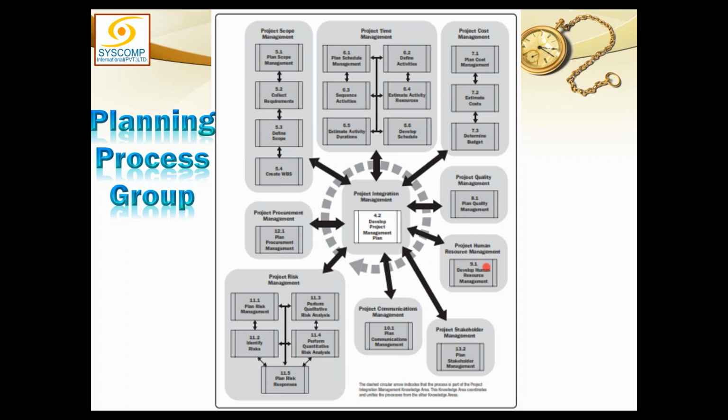I do not create any baseline for any other plan. But I do have management plans everywhere. And those management plans and these three baselines are put together into this project management plan. So the ingredients of the project management plan are all the management plans and all the baselines. How many baselines are there? Three: scope, time, and cost.